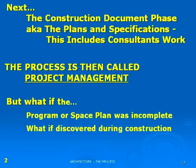What happens if the program was wrong? Let's say we didn't account for some things — there was an issue where someone on the team said, 'Hey, we forgot something on the owner's side,' or a consultant says, 'I didn't take into account such and such.' Well, if that program or space plan was incomplete or inaccurate, the last phase of really correcting that is through the design development phase. Now we're into construction documents — it becomes a little bit harder to make changes, though it is still less expensive. It's almost no cost to make minor changes at that stage.